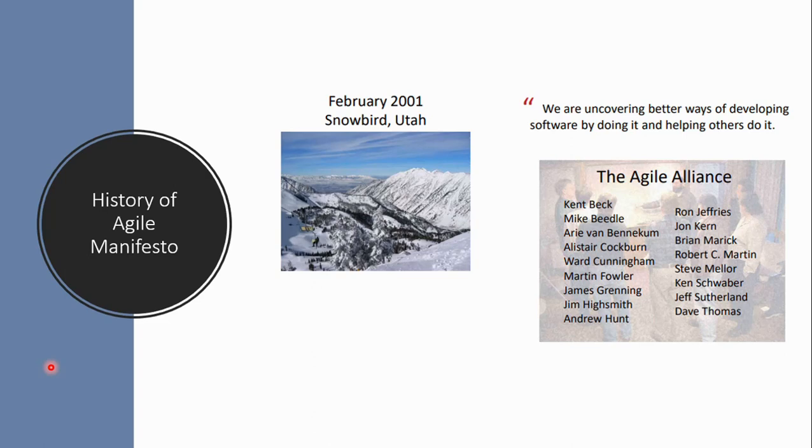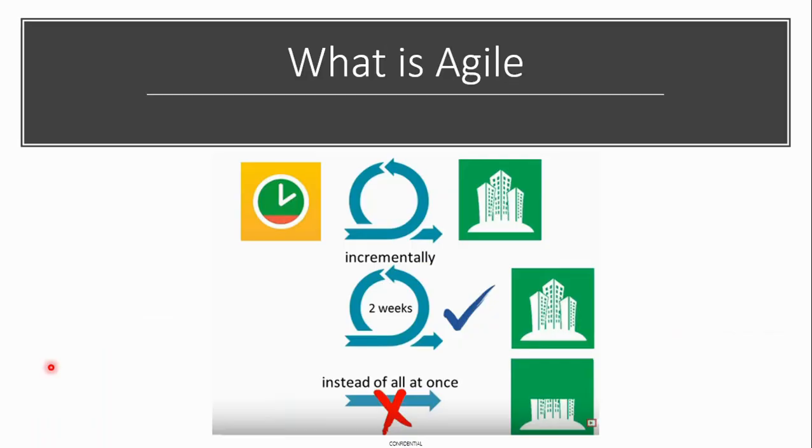So here the main key difference is that you try to incrementally develop a software solution. The project time and the project efforts will go into incremental development of the software in iterative cycles, primarily about 2 weeks, but it depends on your project. So incrementally you develop, rather than delivering the software at once to the customer at the end of the project.